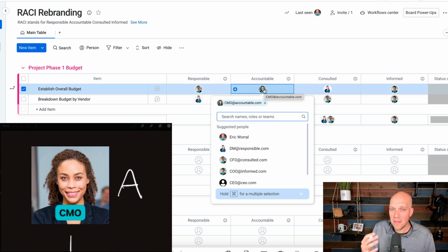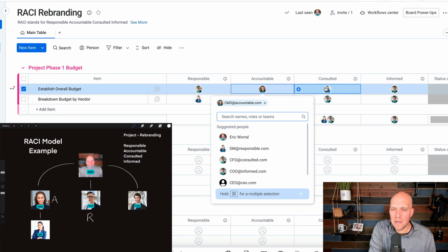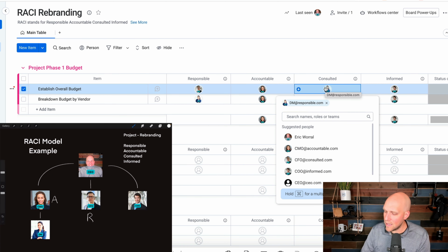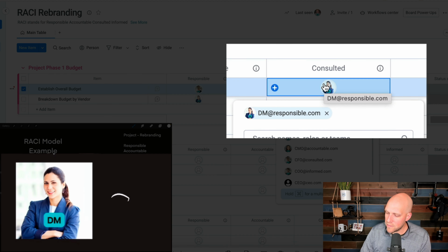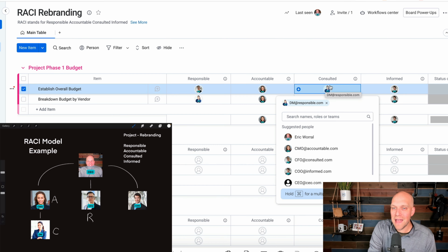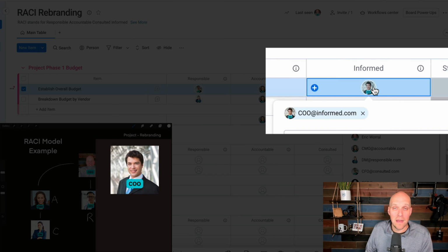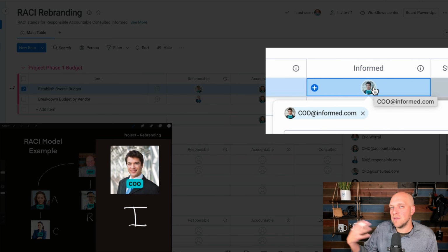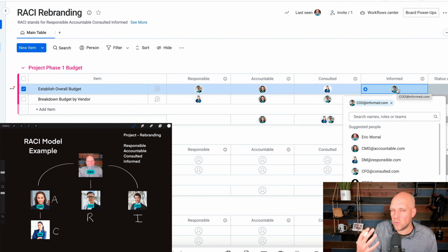this project. Then there is consulted, and what I did for consulted is I decided to make that the director of marketing, because the director of marketing is going to have some key insights on this project and things that need to be done. And then lastly, we have informed, and that is going to be the COO in this particular task. So the COO needs to be informed of what's going on, but not necessarily directly involved.